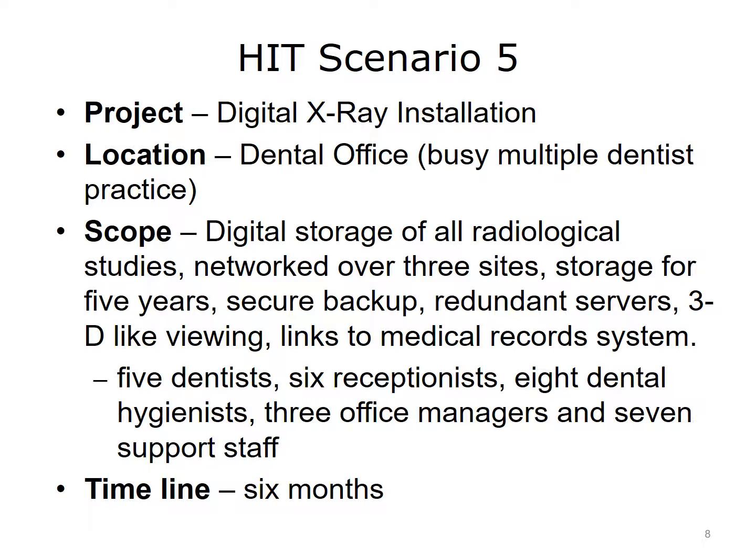In this situation, the project manager acts as a coordinator. Because the workflow in each office may be a little different than the others, your team should consist of people from all 3 offices and include administrative staff, clinical staff, a representative from billing, at least 1 provider, any IT personnel, and of course, the consultant.